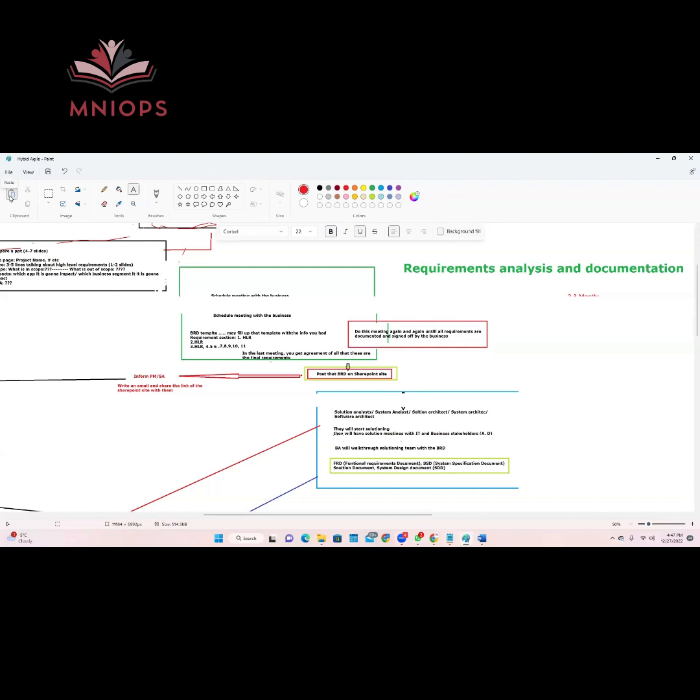Either they invite them, or he or she goes to the teams individually to understand what's going on and where we are at. So project managers have to do a status meeting, which includes all the stakeholders of the project. Those are the primary participants of that meeting, and the team members are optional.